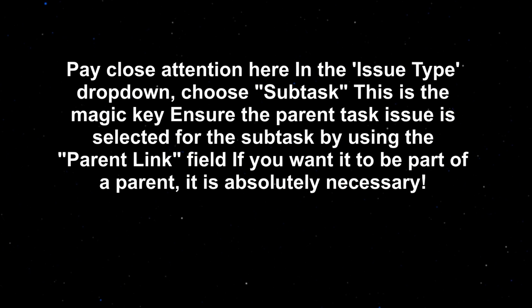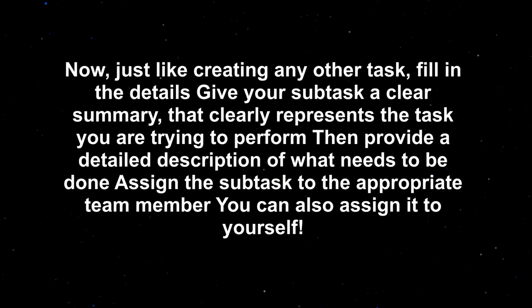Ensure the parent task issue is selected for the subtask by using the parent link field. If you want it to be part of a parent, it is absolutely necessary. Now, just like creating any other task, fill in the details. Give your subtask a clear summary that clearly represents the task you are trying to perform.